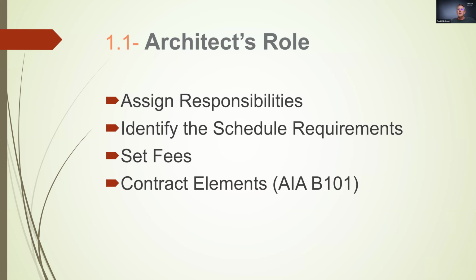The timeline can be a rough outline schedule, or it can be pretty in-depth, and should identify the tasks in the project. The key here for us is to identify tasks or dependencies that might delay the project and affect the owner's timeline. And some unknowns, like if there's a line item to obtain financing, we might need to work on that calendar part of it a little bit, or get planning approval.